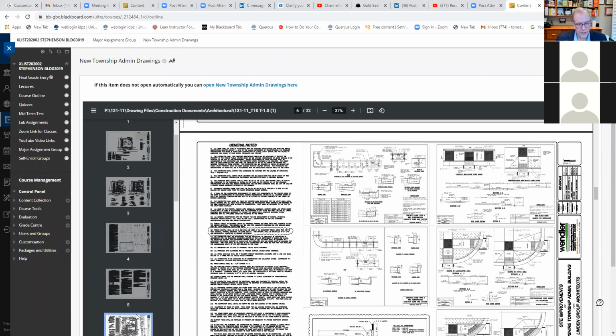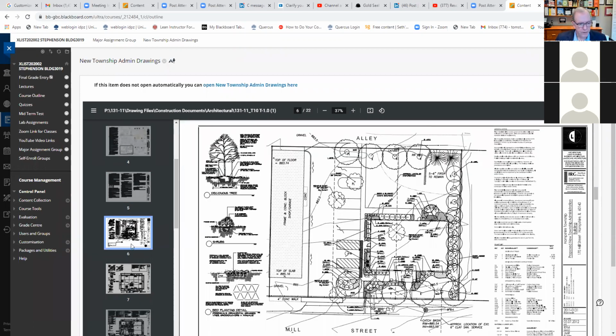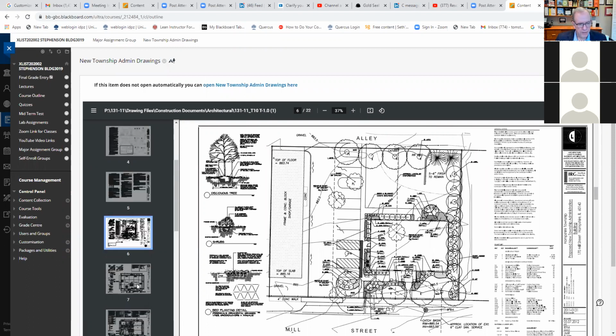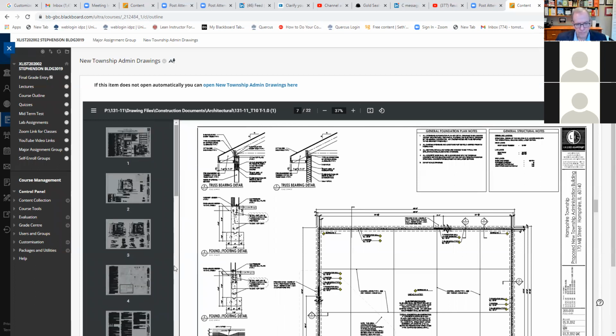So when you're creating your delays, look at the schedule, look at the building, and try to figure out something that would cause a delay, right? So that's how you'll create your delays. And at the same time, before you set the baseline, if you see something that needs improvement or something that's not quite right, look to better the schedule.